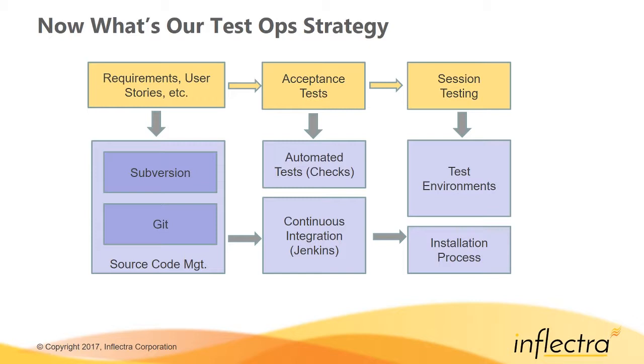And the product owner will write the user story with the client, or maybe the client will be the one to make sure that's the case. There's also two things at the end that I put down which people often forget when we do our testing, which is that you've got to test on the actual environment. It's very easy for a developer to test on their environment, or we do the continuous integration, we build the application, and we test on the build server. We then deploy it onto customers' environments, and it works completely different, and that doesn't always work.